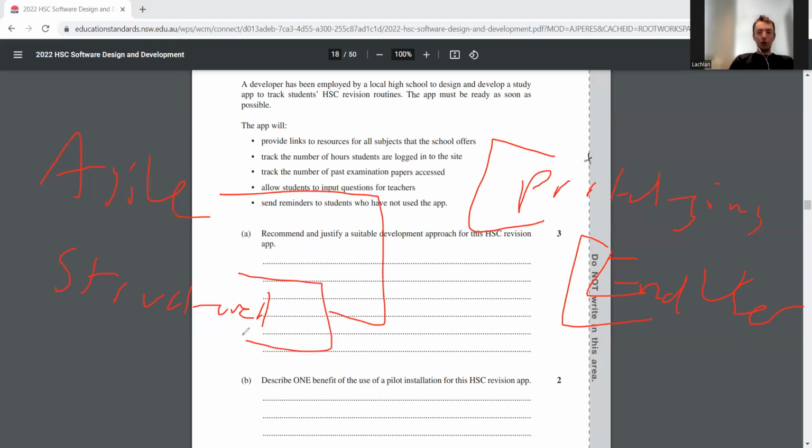So structured is, once again, about if you're doing a large project where there's a very low tolerance for failure, like let's say you're creating medical software for a hospital that administers dosages of medicine, right? That has to be structured because if you make a mistake, it's catastrophic. Agile is more for stuff that's low risk, where you want to quickly get a lot of iterations to get feedback and improve, right?